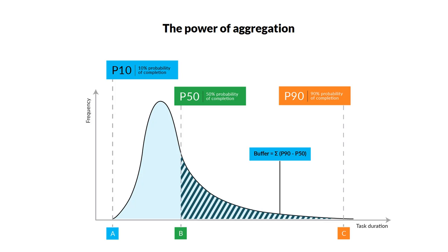In practical terms, a P50 estimate equates to the touch time of doing the work. No waiting around for someone else to finish. You're fully kitted and ready to go just in time. Everything and everyone you need are at the start line. And you're left alone to do the work without any interruptions.